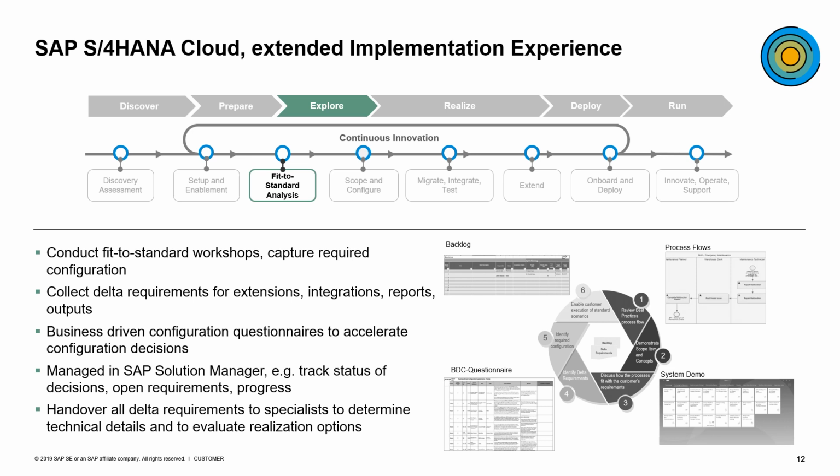As previously mentioned, we have the business-driven configuration questionnaires that will help guide the customers throughout the fit to standard process. We would highly recommend using Solution Manager to check the statuses or decisions, open requisitions, as well as the process itself. We also provide in the roadmap a backlog template to capture any questions that come up during the Fit to Standard workshop.